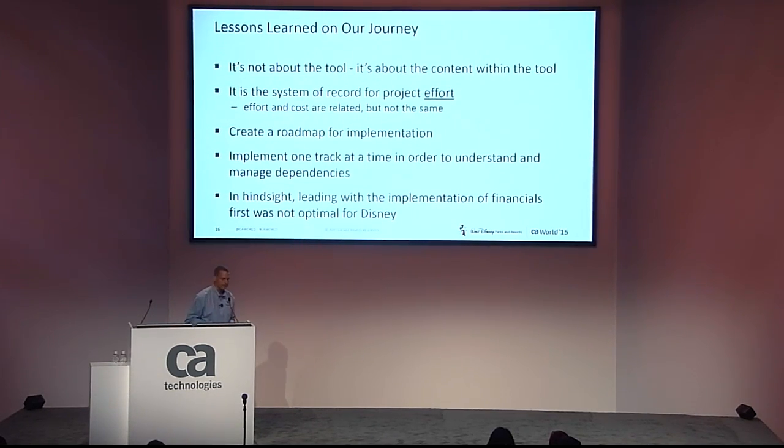those results. We also created a roadmap for our implementation and actually looked at implementing features and functions one at a time in order to understand and manage dependencies, but also to allow the organization to become competent and proficient in each function so they're not overwhelmed as we're trying to address scheduling and resource loading and task management and cost control and prioritization. All those components all at once can be overwhelming, so we're logically looking at a roadmap in terms of what is our capacity to absorb and support that information and how does it derive and show